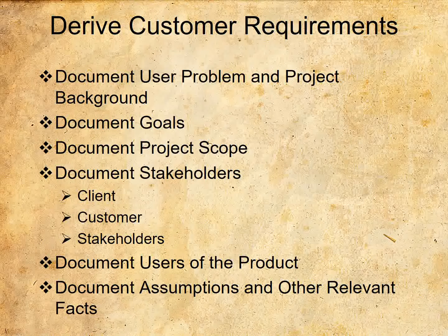estimate. The inconsistencies between derived customer requirements and scope need to be identified and resolved with the support of the project manager. The compiled set of features is then entered individually as per the table provided in the requirements information gathering template. At a minimum, there should be at least one customer requirement captured for each strategy identified in the goal model. Here are some detailed guidelines.